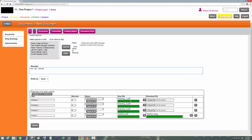If it's a single PDF file it will upload into the View file section. If it's a PDF and DWG file, it will upload the PDF into the View section and the DWG into the Download section — so you end up with one document title containing both a PDF and DWG. The system automatically picks up titles from the file names so you don't have to type a name for every document. If it's the first upload, the system assigns revision A, or you can change it to revision B for the next revision.